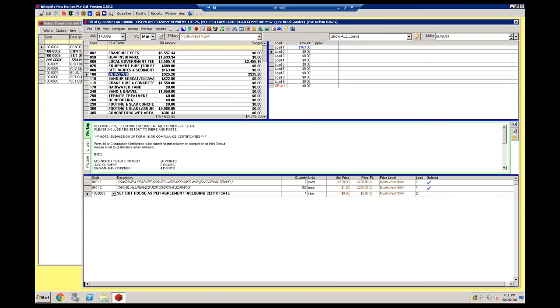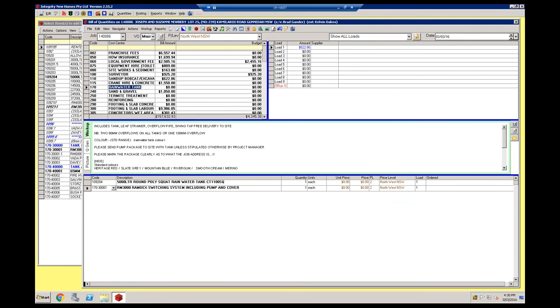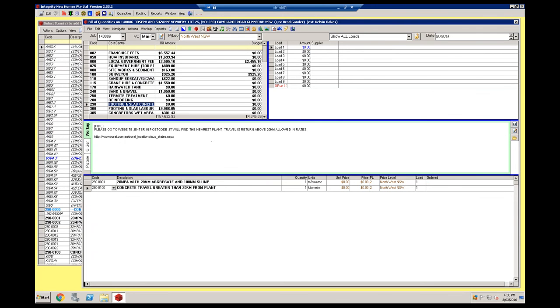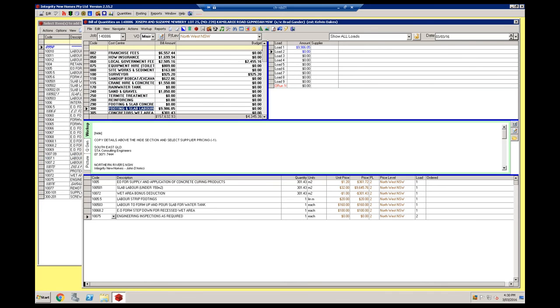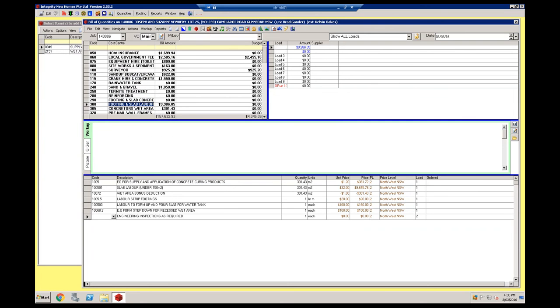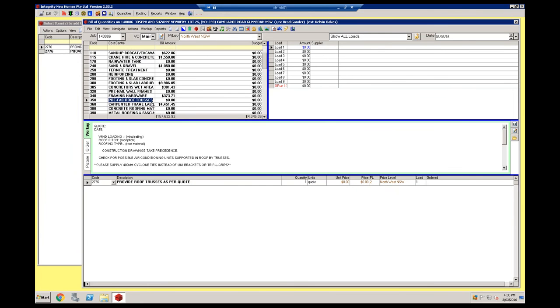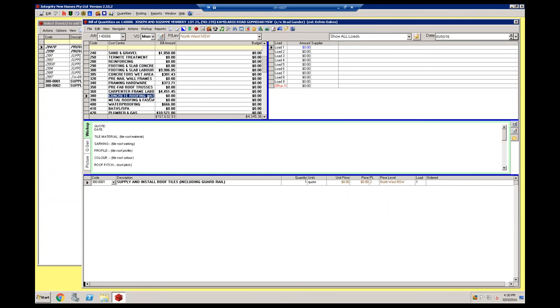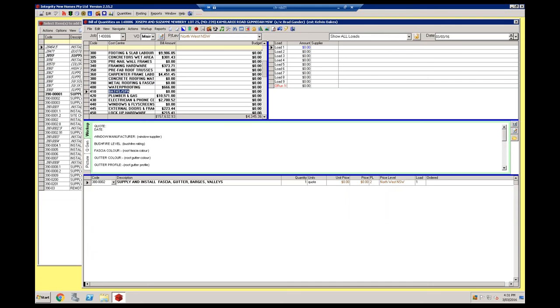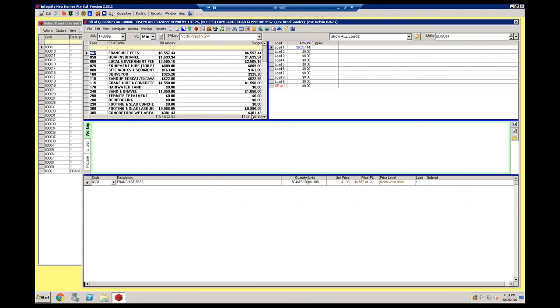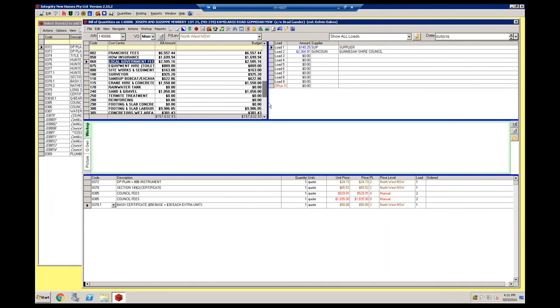So it has now gone ahead and automatically exploded all of these standard house items into the job. It's assumed 20 MPa concrete for slabs. It's got all our standard items for a standard house. Now we just populate the information, or remove and replace as required, and go from there. As I was saying earlier, we've gone from $4,000 to $157,000 worth in the bill of quantities.